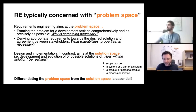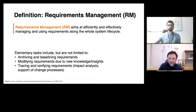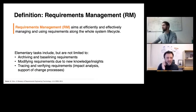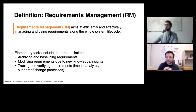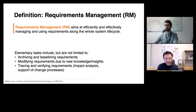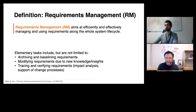Another term next to requirements engineering is requirements management. When engineering means that we elicit requirements and engineer a requirement specification, management means managing and using requirements along the whole system lifecycle. This includes things like archiving requirements, versioning requirements, baselining requirements, or packaging them in different releases, modifying requirements and accommodating change management. Requirements will always change, especially in long-living systems and long-ongoing development projects. We will be having a dedicated lecture only on requirements management towards the end.